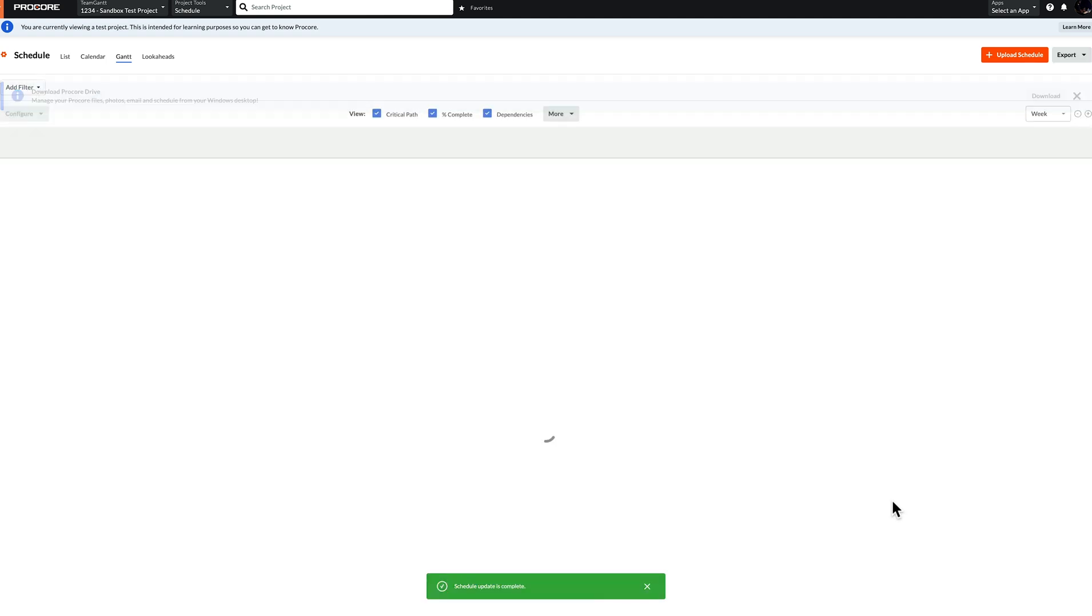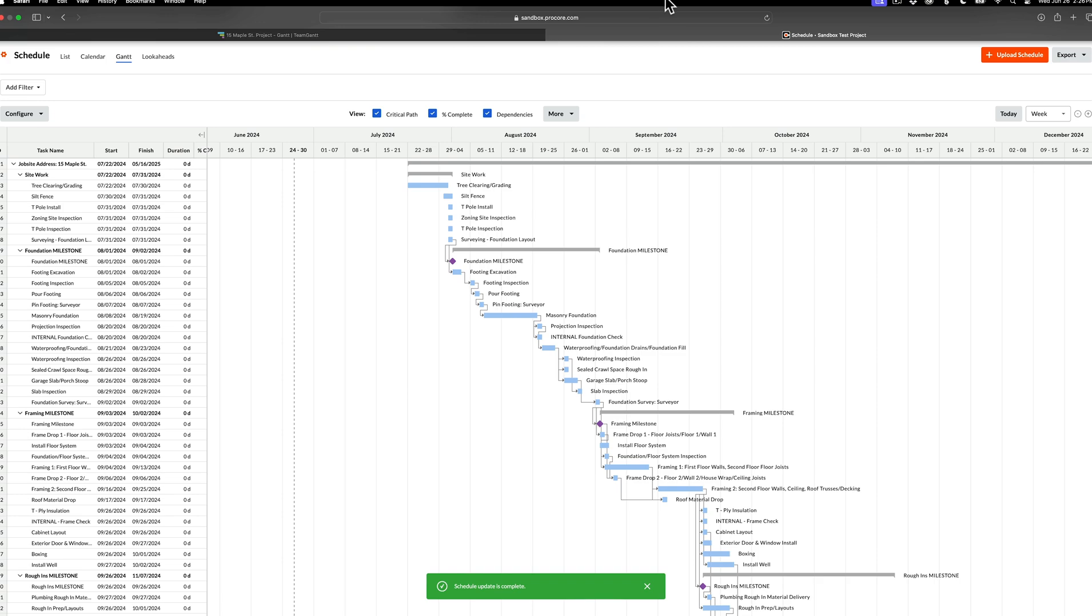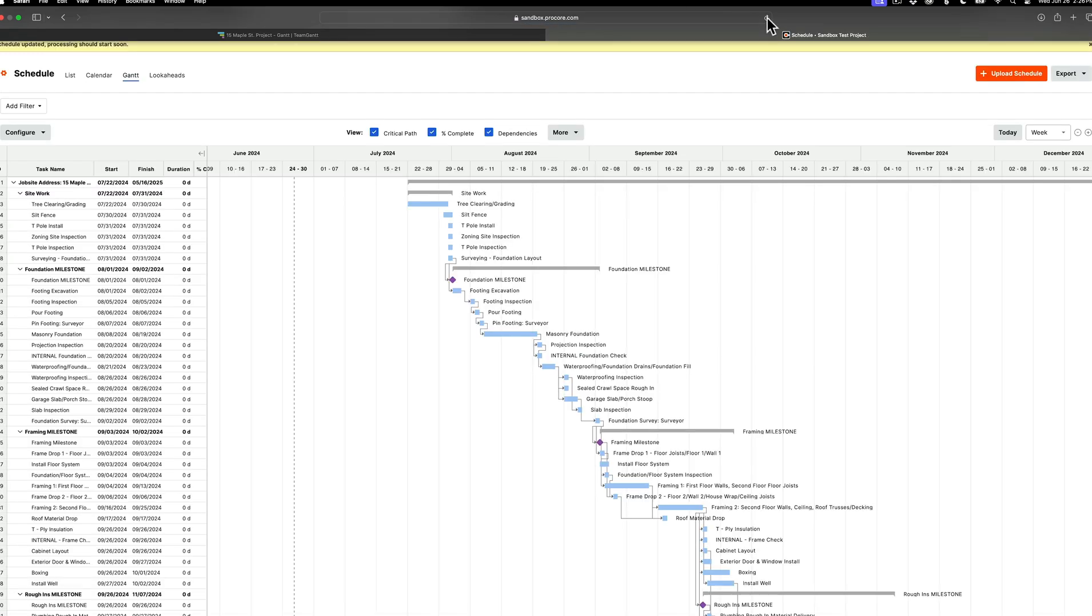Once this is done loading, it's recommended that you refresh your page since there may be a delay or error in the upload until a refresh has been made. It's that simple. Whenever you need to make changes, you can easily make them in TeamGantt and then follow the same process to update your project schedule in Procore.